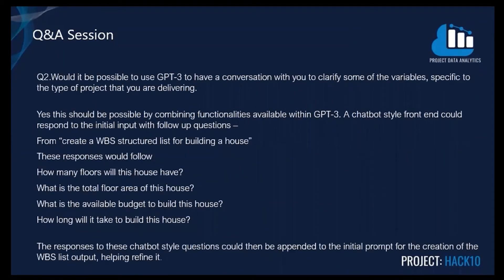Question two: would it be possible to use GPT-3 to have a conversation to clarify variables specific to the type of project being delivered? Yes, this should be possible by combining functionalities available within GPT-3. A chatbot-style frontend could respond to the initial input with follow-up questions — for example, from 'create a WBS structured list for building a house,' the responses would follow: how many floors will this house have, what is the total floor area, what is the available budget, and how long will it take to build? The responses to these chatbot-style questions could then be appended to the initial prompt for the creation of the WBS list output, helping to refine it.